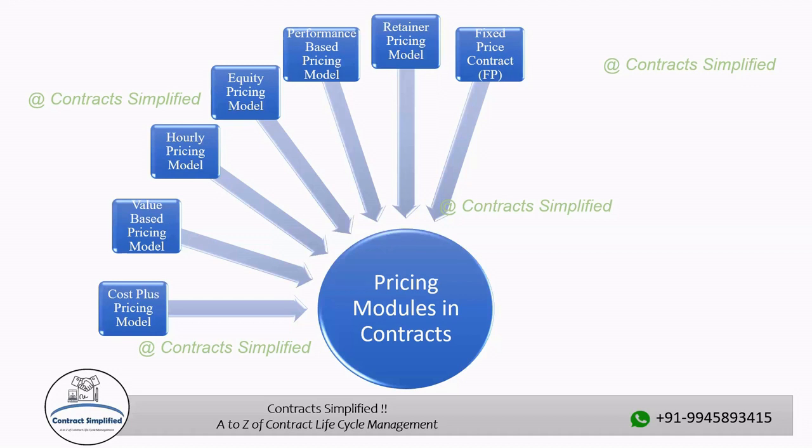Fixed price incentive is a type of contract used in project management and procurement, often in government or commercial settings. It's a contractual arrangement between the buyer and the seller that defines how the project will be executed and how payments will be made. In an FPI contract, the total price is fixed, meaning that the agreed upon amount of money to be paid for the project remains constant regardless of the actual cost incurred by the seller during project execution.